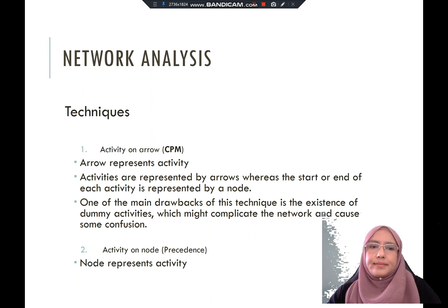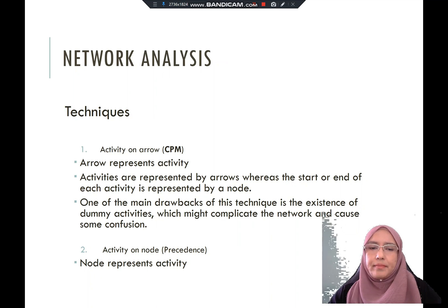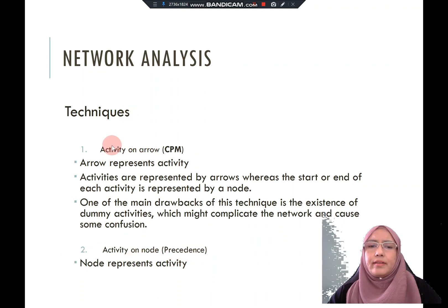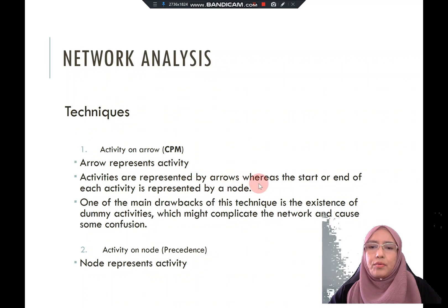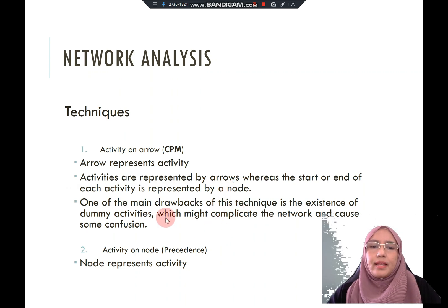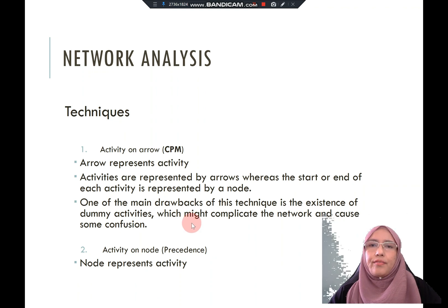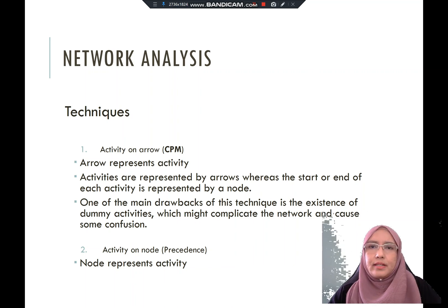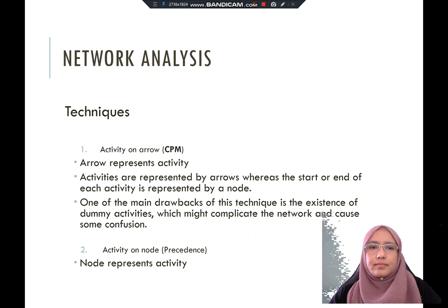The first network technique is activity on arrow, which is what we call CPM. Activity on node is called precedence diagram. In activity on arrow, the arrow represents the activity, and the start or end of each activity is represented by a node. One limitation of this approach is the existence of dummy activities, which can complicate the network and sometimes cause confusion to team members.